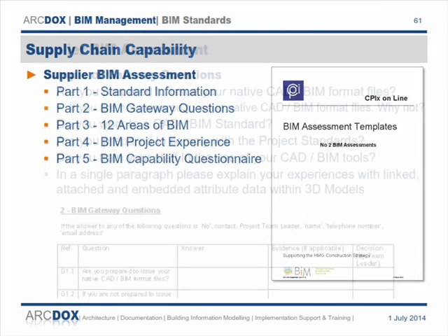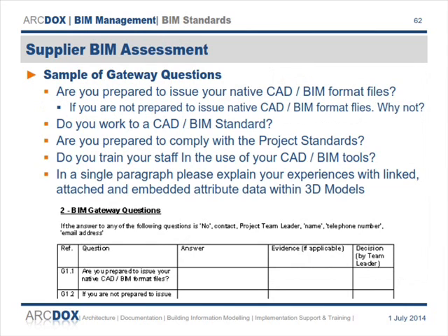And then there's a section on gateway questions. And again, there's 20 or so gateway questions that you need to respond to. And they are all framed in a way that, are you prepared to do something? If not, why not? And if the answer is no, then you're told you need to go back and talk to whoever's tendering the project. Your answer needs to be yes, basically, is what they're saying, and you need to determine what.